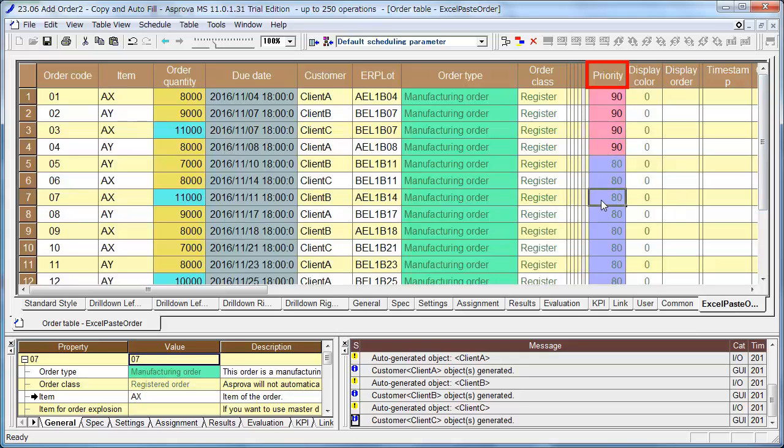Please change the priority of order 07 to 20 in order to make order 07 a filling order.